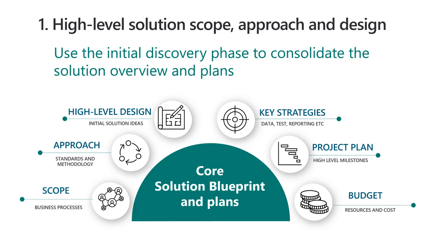You'll have your key strategies available to you, like what is going to be your data migration strategy, what is going to be your test strategy, what is going to be your reporting strategy. And normally all of these things are already there. It's a question of making sure you bring them all together and refine them to the point where you say, yeah, this is now sufficiently ready for us to be able to go start the sprint phase.